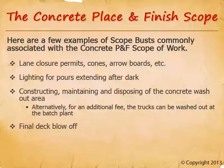Prior to placing concrete on a formed deck, the deck needs to be cleaned. With rebar laid out across the deck, we can't sweep it with a broom — so we blow it off with compressed air. But prior to blowing off the deck, we need to take care of a safety issue: the potential for airborne metal fragments. The formwork subcontractor is usually good about picking up their nails, but we need to make sure they pick them all up. Even more important is the rebar subcontractor and their tie wire clippings — those get everywhere. The rebar subcontractor may need to drop a magnet between each and every bar intersection across the deck to pick up all those tie wire clippings. When those clippings are hit with compressed air, they go airborne and are serious safety hazards. The rebar subcontractor needs to be responsible for cleaning up their own tie wire clippings — all of them. Be sure this is addressed in the bid instructions, be sure they don't exclude it in their bid, and make sure this direction finds its way into the subcontract agreement as well.